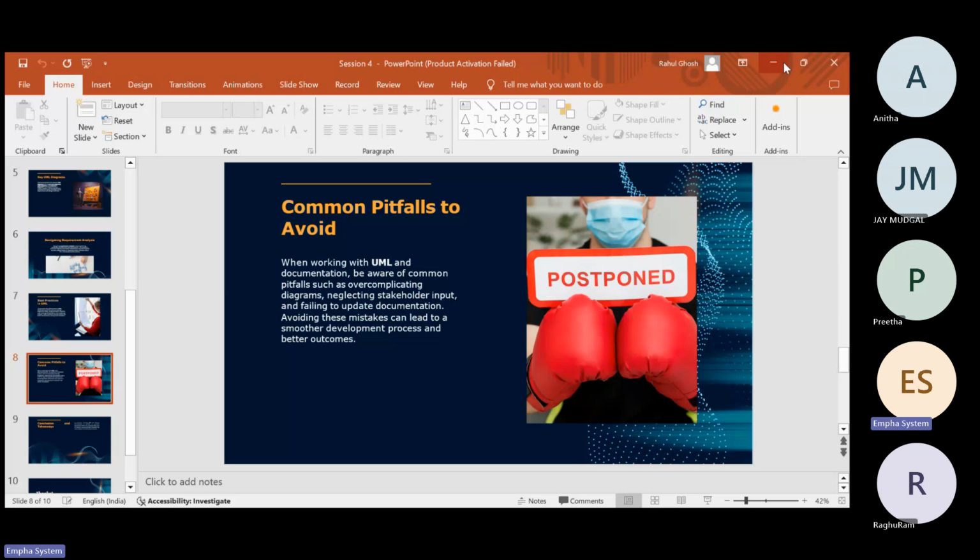The business related problems: why is the client asking us to develop an online ordering portal? What is the background of the project? Why does the client want to develop this kind of thing? What is the key area? What is the trigger point? Those kinds of things will be mentioned in the BRD. Remember something: BRD is the high level requirement document, nothing else. It's not going to be technical, it's going to be all about business.